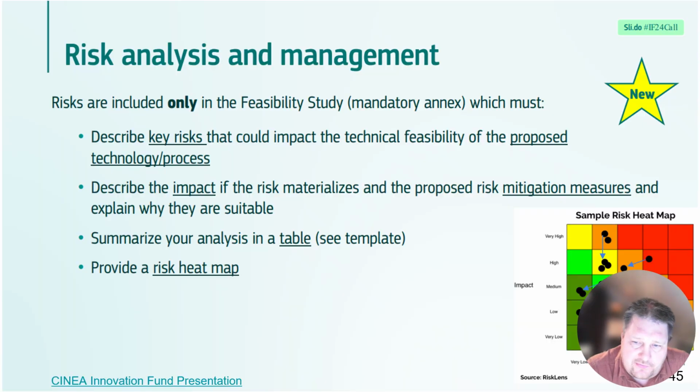You can also track the change of risks, the risk without mitigations and the risk with mitigations. You can track them, for instance, like arrows like this, showing that you have dealt with the most important risks, and they have now been shifted towards less severe risks.